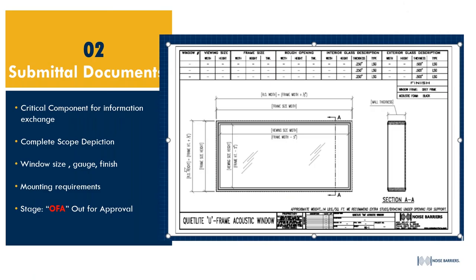Submittal documents are critical components for information exchange. We want our drafters and PMs to have everything possible from the sales rep or direct customer so submittal drawings are executed properly and delays are prevented. Key information needed includes: complete scope description, window size, gauge, glass thickness, finish, mounting requirements, stud type, and the type of opening the window is going into — to ensure proper set screws and installation details are allocated.